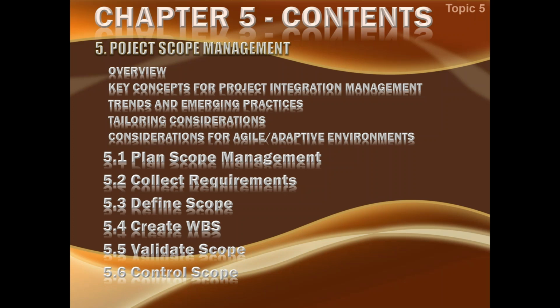Task and activity are one and the same thing. So a work package is a level above the activity, and it is a package of work which may include a number of activities. Although we can break it down to the activity level, as far as the requirement of the scope is concerned, it is enough if we can subdivide it down to the work package level. We'll talk about work packages later. So this is all we have to do in planning about scope.